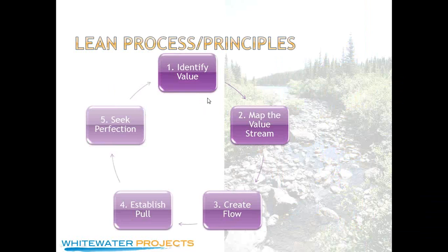The way you start doing Kanban is to go through this lean process. Anytime you start a lean project, you want to go through five steps — these come from lean.org, the mothership of everything lean. First, you want to identify value. In the case of a software development organization, working software features delivered to the customer is what value is. Then you would map the value stream — the steps along the way to the customer where value is created, from the customer's request for a feature all the way through to the delivery of that feature.